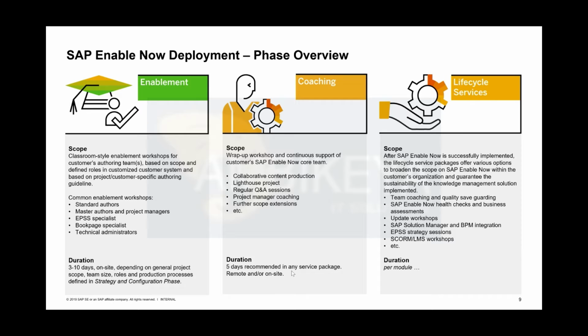I usually have those 4-hour jour fixe based blocks at the end of the service that I usually schedule together with the customer team, like every 2 weeks, bi-weekly Fridays, half a day, Q&A for your authoring team, review what you've done so far, check the content for quality, give advice, give some input regarding didactical or media didactical quality, etc.